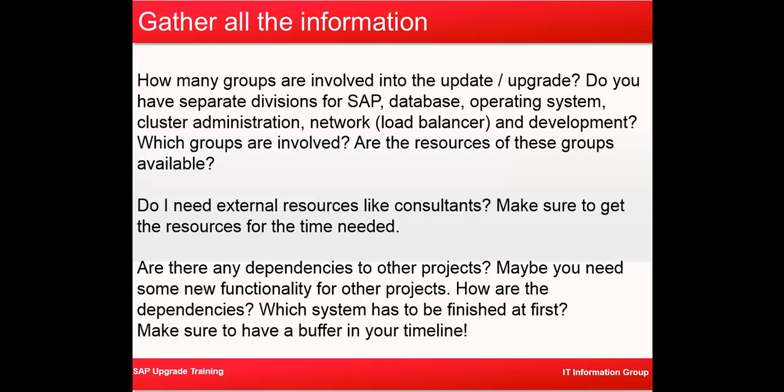And the next thing is you will check your dependencies in the project. Maybe you need some new functionalities for other projects. How are the dependencies? Which system has to be finished first? Make sure that you have a buffer in your timeline as well. You may also need to evaluate your dependent components and dependent systems, which need to be upgraded.